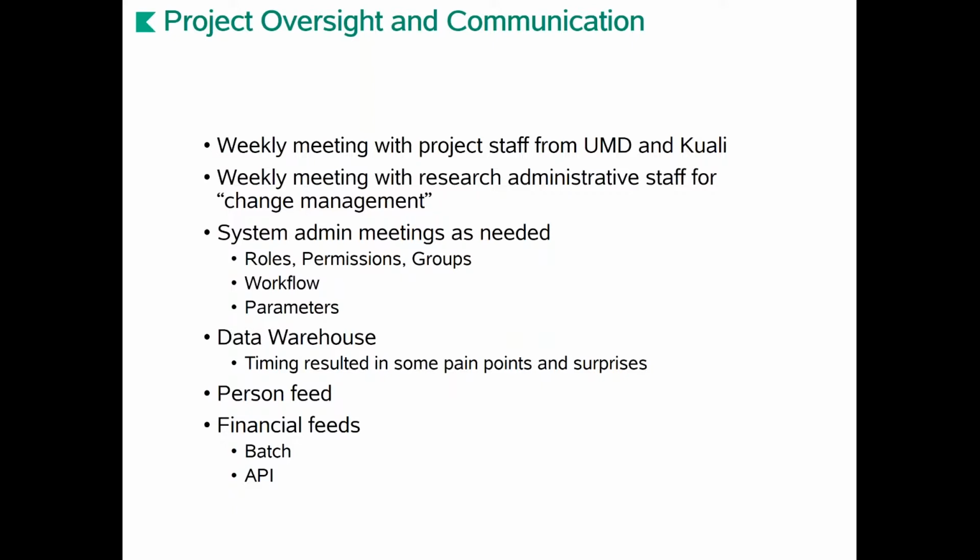Maryland had an additional problem in that we were bringing up a new data warehouse. We were moving from an Oracle on-premise to an Amazon Redshift data warehouse. So we sort of got out in front, and that messed up some of our timing. So you want to think about the impact this is going to have on your data warehouse.